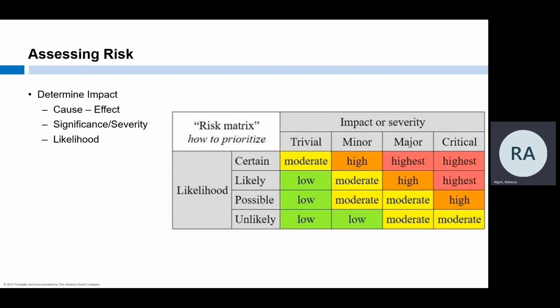With our risks identified, we need to consider what happens with the study should they occur and what risks really need managing. A risk matrix, like the example shown here, is a very useful tool. By considering the likelihood of a risk occurring and its significance on the study, we can quickly identify the greatest risks to our project and use that information to develop a risk management plan.